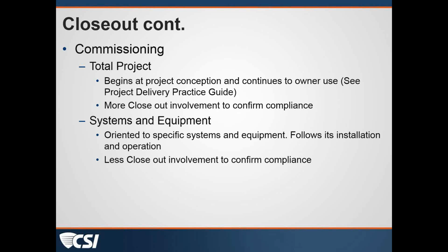There's an interesting comment here from Drusilla indicating that AIA best practices addresses the difference. I'll post the link to it in a second on the chat box for everyone, but it indicates that the contractor shows in red ink on-site changes to the original construction documents, whereas measured drawings are prepared in the process of measuring a building for future renovation or as historic documentation.